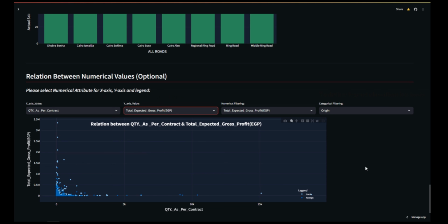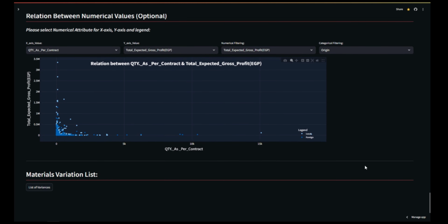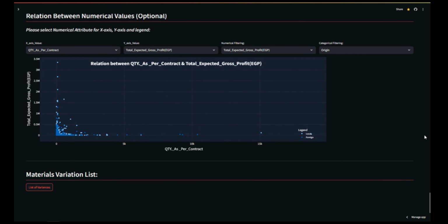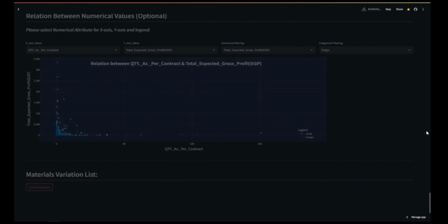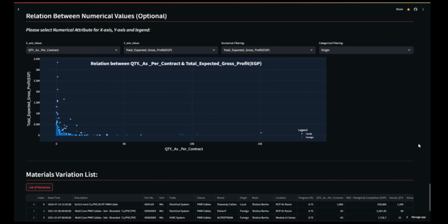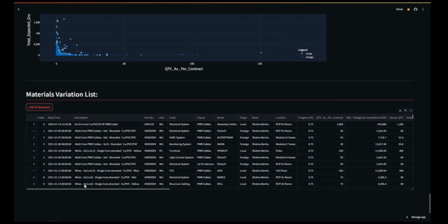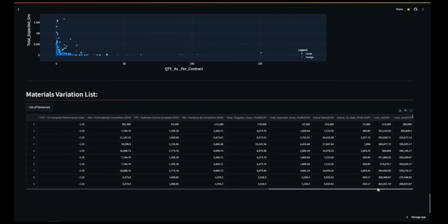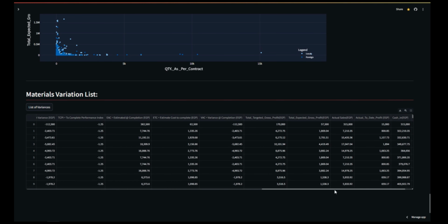At the end, technical and cost control teams are asked to prepare delta sheets showing quantity variance between what exists in the contract and the actual quantities required based on site conditions or client requirements, and it requires big effort by teams to prepare variation orders. Now it is very easy to generate that sheet with one click, which can filter and extract all items with quantity variance larger than 0. Then the extracted schedule can be downloaded directly in .csv or Excel format.